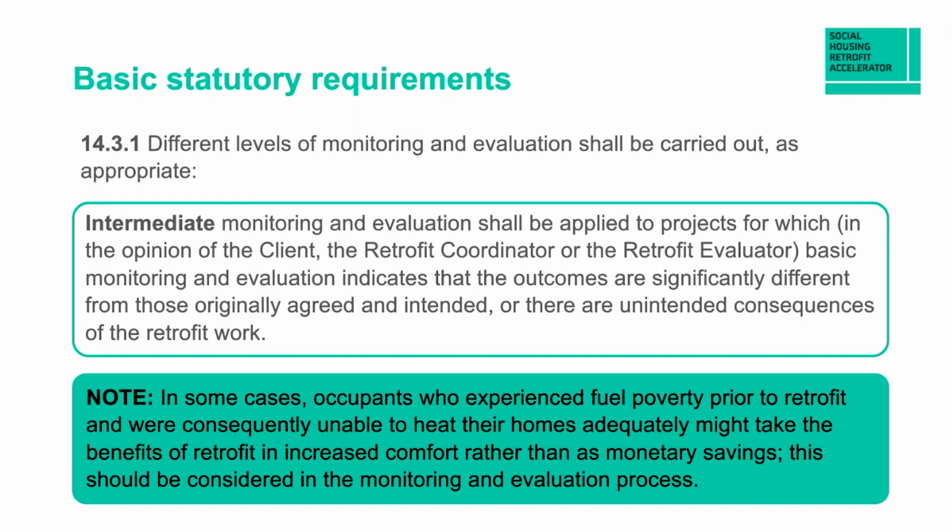So if we only did the customer survey in the first instance, when it's not working, we'd want to put in perhaps 3 months of monitoring to see how things are going. So what you might want to do is have a look at monitoring your energy use, looking at the time and day that the air source heat pump is on, maybe putting in some data loggers to measure the internal temperature of the property.